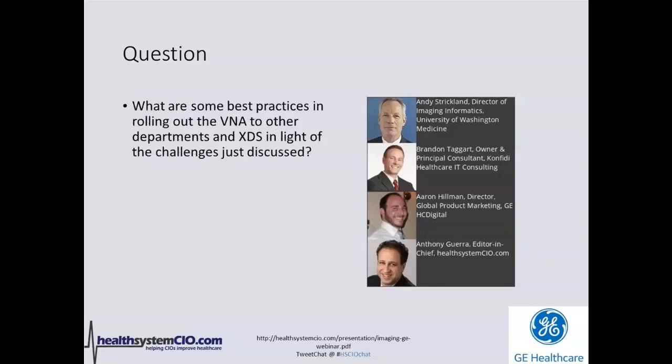So best practices in terms of rolling out VNA, again, as I stated, start with your data migration. Even if you haven't selected a VNA vendor yet, you may want to be staging your data already, ensuring that you have the cleanest form of data prior to moving it to your VNA target. Beyond that, you need to understand first what kind of VNA do you need. Not all VNAs are created equal, and there's kind of a pick list in terms of the functionalities that you're going to receive with your VNA.